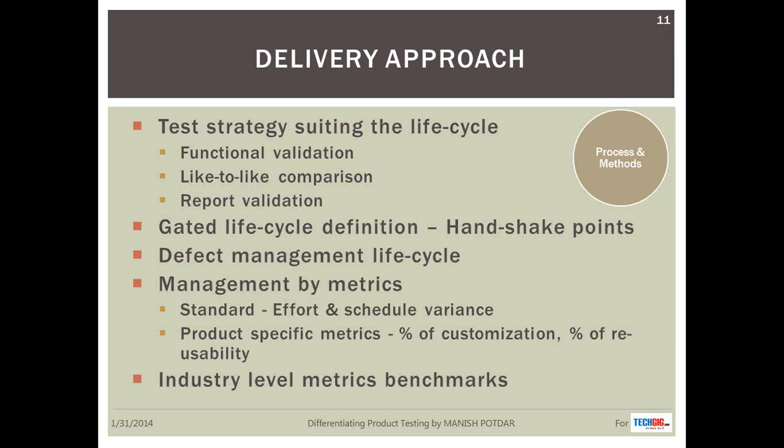Equally important is the defect life cycle. If you have a defect logged, and the defect is a pure-play core product defect, definitely it has to go to the product vendor to fix it. And if it is routed through your customers, then you can imagine the kind of communication gap it can pose. You have multiple channels of communication, multiple steps of communication.